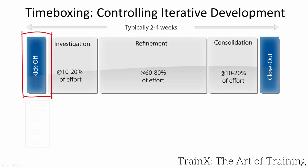At the initial meeting called kick-off, the SDT are provided with a subset of requirements from the PRL. They meet — ideally with the project manager present — with one hour allocated for each working week, so a cap of four hours for our example. Within kick-off, the SDT need to understand the timebox's objectives, accept them as realistic, and agree on at least the high-level acceptance criteria. The PRL's requirements development effort has already been top-down estimated during foundations, ideally by the team itself.